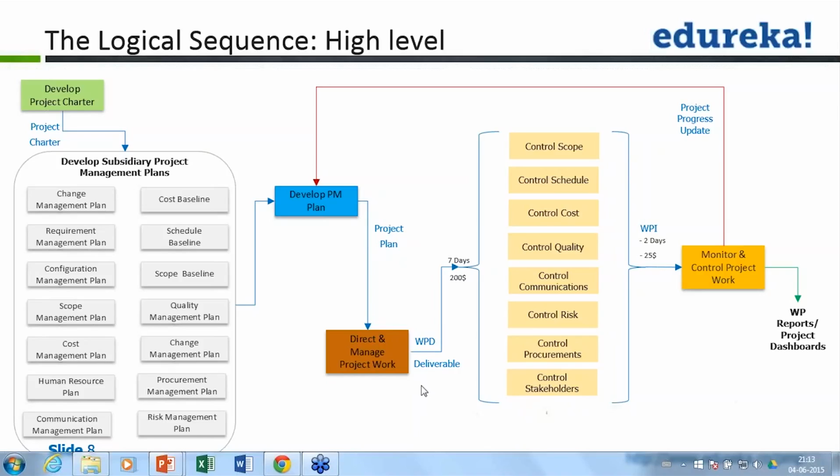When we prepare our risk register, you need to identify all the potential threats to the project. One of the risks can be that we do not have control over the vendor beyond a point. So the vendor may delay the delivery of the work or the deliverable. That can be a risk, and you will have to prepare an appropriate action plan in case the deviation goes beyond a point.